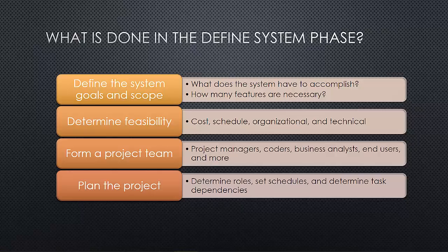Basically, this is assigning tasks, determining deadlines, and figuring out what needs to come first, what needs to come next, etc. For example, you can't write a query until the tables are done. You can't have the database objects created until the data is cleansed, etc., etc.